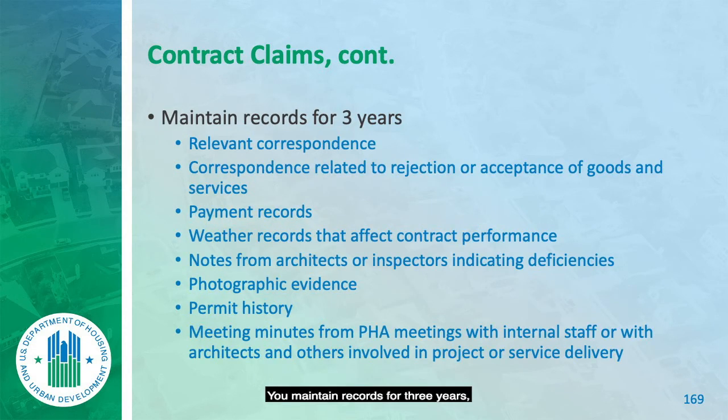You maintain records for 3 years, all records of everything, including all relevant correspondence, including notes to the file. Remember I talked about notes on Post-it notes or just loose pieces of paper you write stuff on? That goes in the file. Make sure any notes you have are always dated and timed. My Linda, she would have a left-hand column on her form that she put in the file.